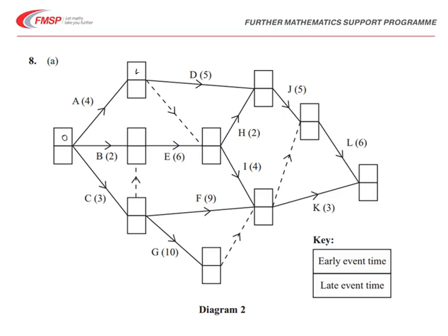So looking at activity A, leading to that point gives us 4, and then well, we have to be a little bit careful with B, because you'll notice that here there is a dummy activity in here, so it's not 2 at this point but 3, which needs to go in here, and also a 3 for C. Again, looking at the dummies working forward from there, from the 3, then activity E is 6, and that gives us the greatest value there of 9.